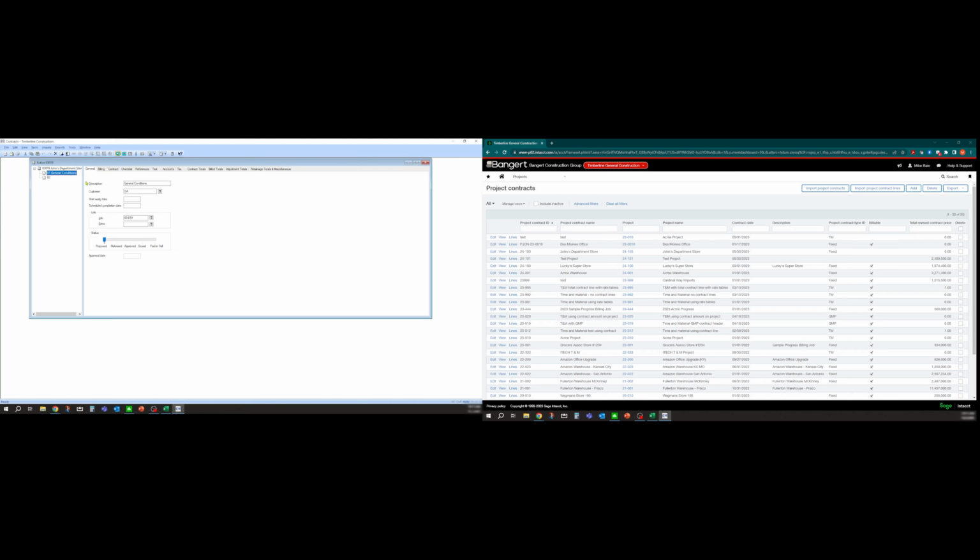But if you get something wrong at this first line and you don't realize it until you create all the 100 lines you've already created, to correct it, you have to go into each line individually and make those changes. It's really stressed in training for 300 that you get these contract line items correct on the first line.